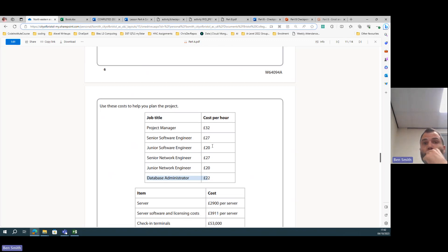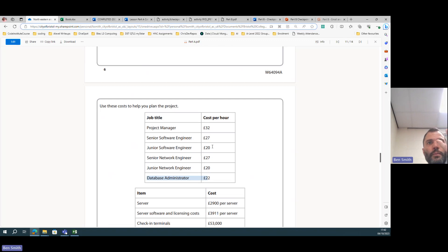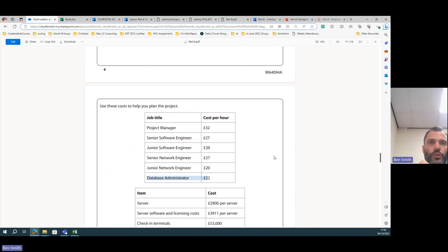So by adding more resources to a task you can divide it by two or by three or however many you add, as long as they all cost the same. You don't have to worry about costing it up or adding a little bit on.